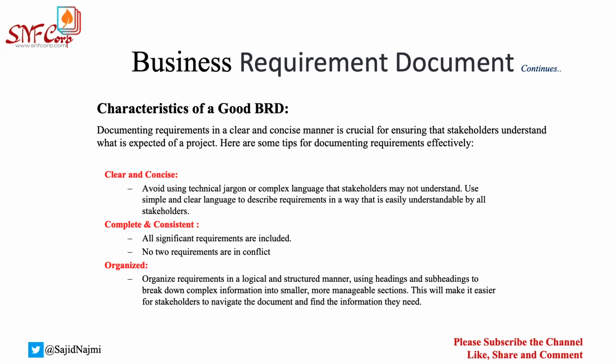It has to be complete and consistent. You would want to make sure you're writing all possible requirements. Everything is included. You don't want to miss anything. Otherwise, you will be in trouble during the UAT. Sometimes business doesn't give you the whole requirement. Based on your research, your analysis, your discussion with business and the team, you come up with things and inform business, hey, I think you also need this thing. And then business adds those things in the requirement. So as long as it is not signed off, while you're in the process of writing this documentation, you may always change things. Once it is signed off and baselined, you will not. So make sure that it is complete and consistent.